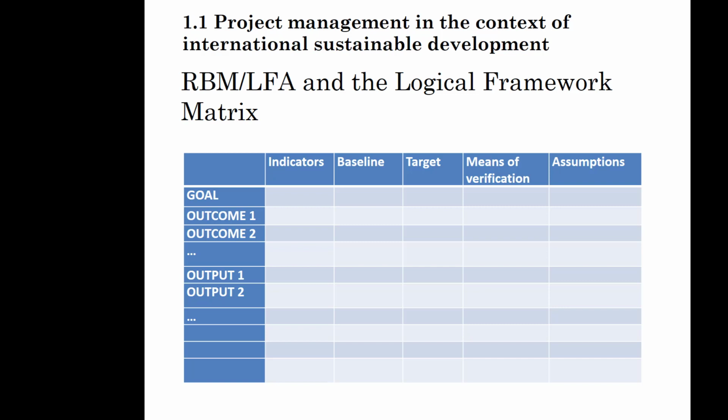Nevertheless, despite the good intentions of the logical framework matrix, the majority of projects are still based on very weak log frames. Instead of being used for explaining the complexity of the programs, because of all these standardized templates and lack of space for explaining the problems, dependencies, and preconditions for the results of the project to unfold, the assumptions column came to be used as a very summarized column, without many explanations of the external dependencies and risks of the project.